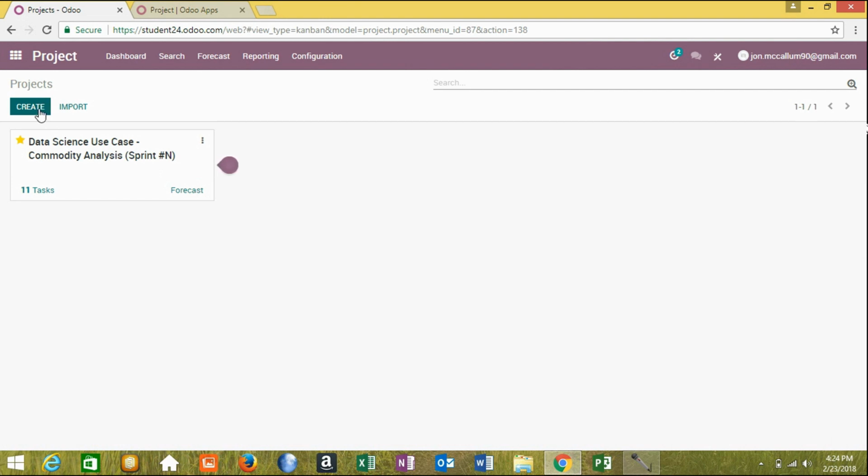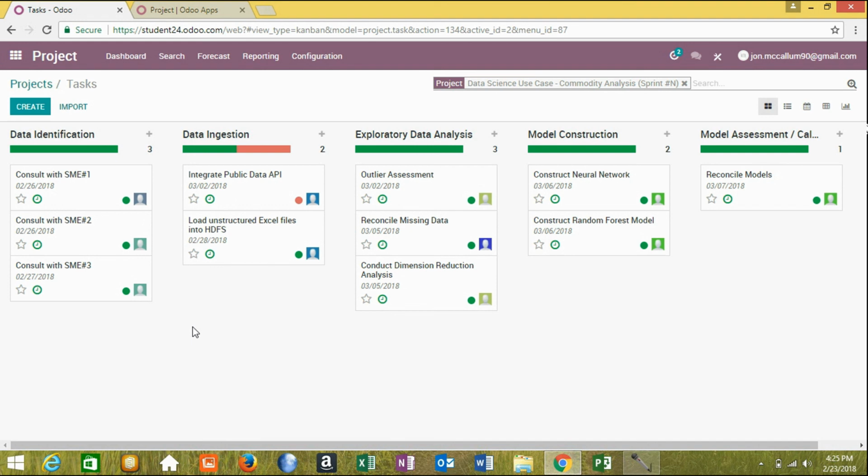So if you are experimenting with an agile methodology, typically you'll want to break these types of phases into 2-week sprints. So in our case, I have an arbitrary example already set up for a data science development team. So it allows you to specify the activities that are going to comprise this initial phase, this 2-week sprint. And within each one of those activities, we can specify additional tasks. We can also specify additional subtasks, things that we know we have to do in order to support the task, and also assign values to this.